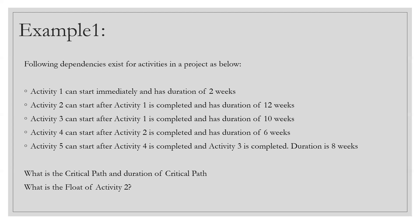Once you scan the question, your immediate task is to pick up the pen and paper and draw the diagram. Use plain and simple rectangles or squares for activities. Don't use circles, because with circles you may lose track of the corners used to mark early start, early finish, late start, and late finish. Always use a rectangle — it's easy to mark all four corners, and the center holds the float value.